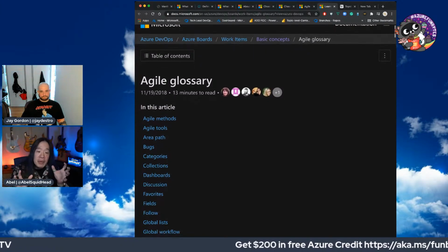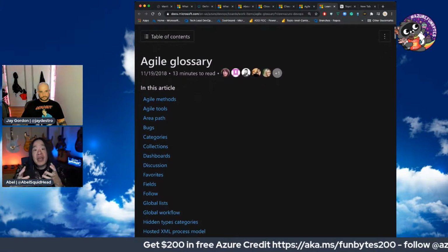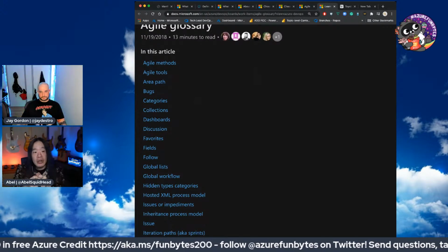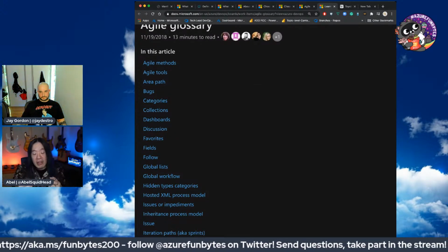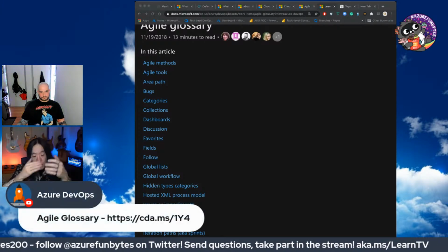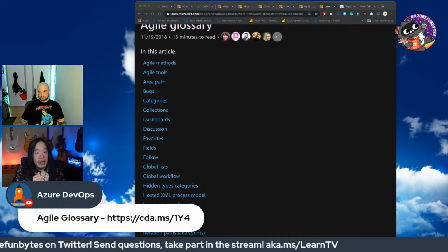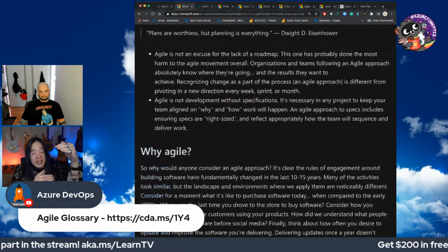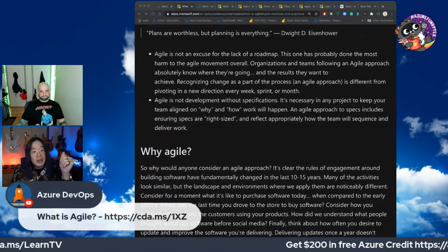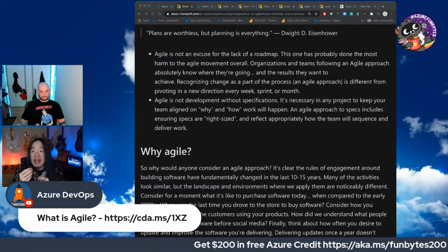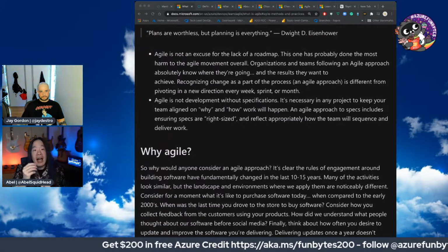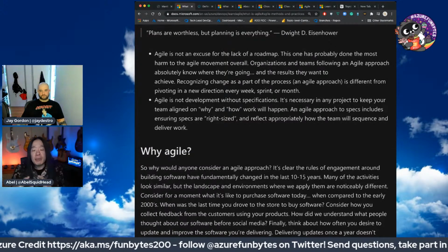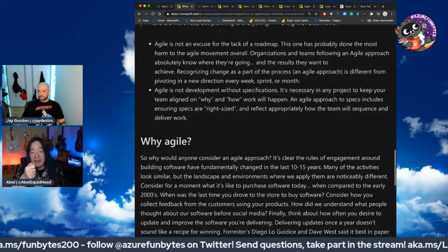But then you'll have somebody, a product owner, somebody that has stake in the product, someone that can decide what it is the product should do. The product owner will then look at this product backlog and prioritize it and say, which one of all these ideas is most important? And then that's when the dev team can look at this prioritized list, start from the top, work their way to the bottom, right? And they'll look at it and be like, great, from this prioritized list, I think we can do the top 3 items. I think we can get it done. So let's commit to it. For the next sprint or for the next iteration, let's do those first 3.